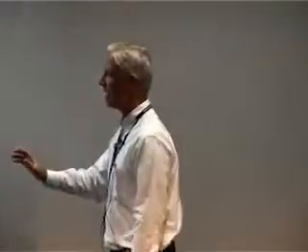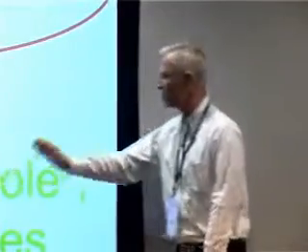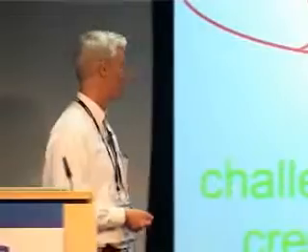And the mentality often in outsourcing is, oh, we'll just give the simple, sort of focused, highly prescriptive tasks to the offshore group. And what that leads to is that people feel a sense of disempowerment and a lack of any sense of challenge or creative opportunity, in which then there's a reduction in morale and they feel like their job sucks, there's no interest in it, and all kinds of bad things happen as a result. On the other hand, if you give the offshore team challenging whole end-to-end work responsible for requirements analysis, architecture, design, testing, directly interacting with subject matter experts in your company, if you really give them whole work, this will create the environment in which they can rise to the challenge, be more inspired, and be more fulfilled in their work, which will lead to all kinds of good things.